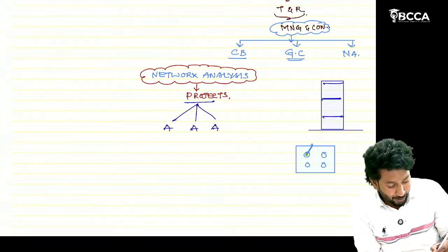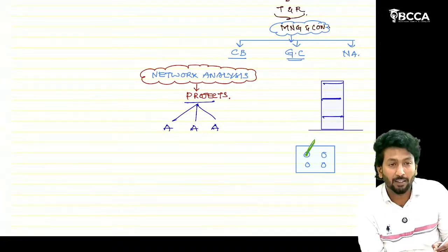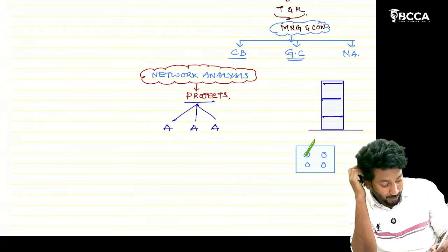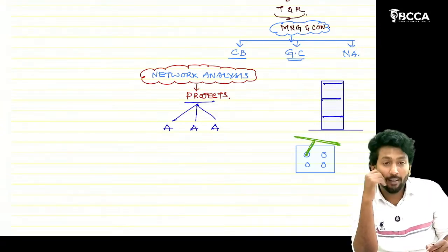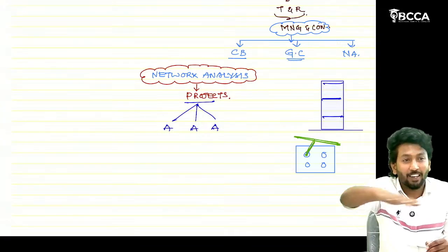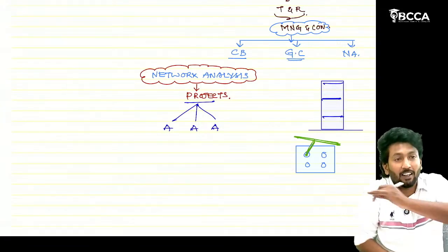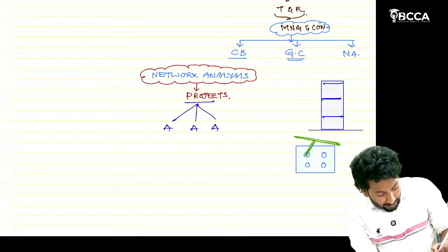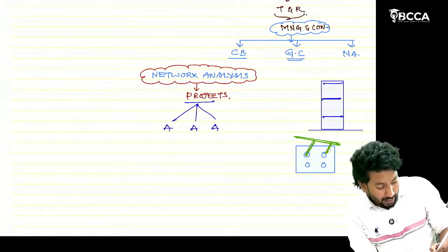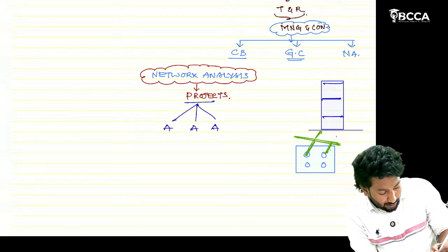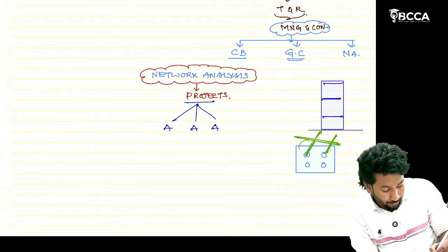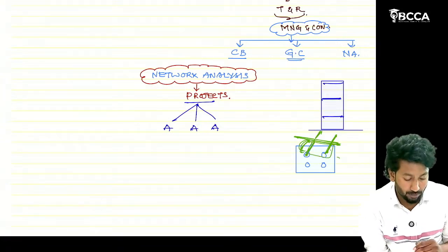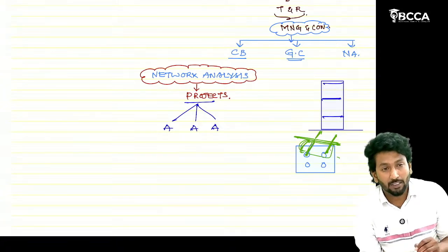After digging holes, we have to construct some pillars. After constructing pillars, we construct the first level slab. After the ground level slab, they can construct the pillars for the second floor, and at the same time they can construct the walls in the ground floor, sir. Ground floor or first floor, whatever. Like that, simultaneous activities will also be there.